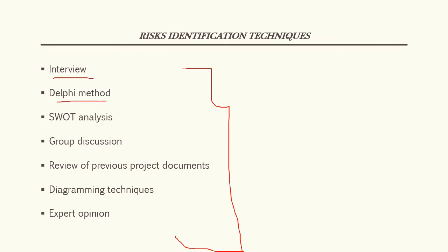We also have what we call the Delphi method. The Delphi method is an estimation method where a structured group of subject experts are given the opportunity to answer questions in two or more rounds, predetermined by a stop criterion. At the end of each round, the coordinator will deliver anonymous questions to each panelist to make a determination or judgment. However, during this process, the range of answers keeps decreasing until the group converges on a particular answer, which is deemed to be the correct answer. That is what the Delphi method is all about.